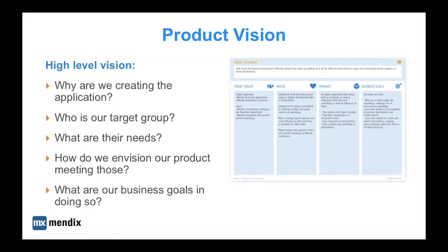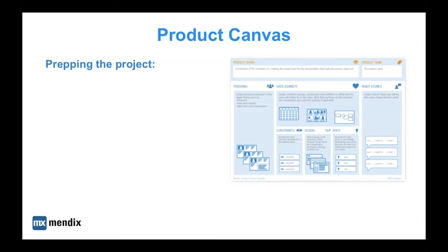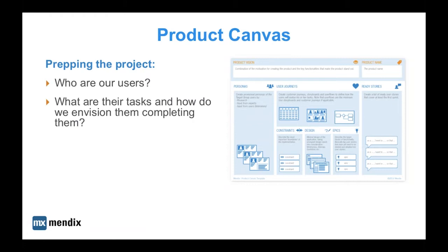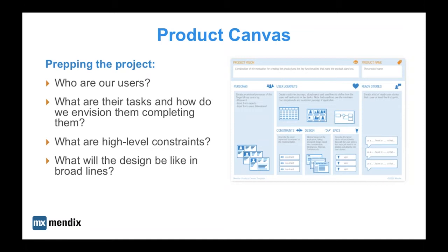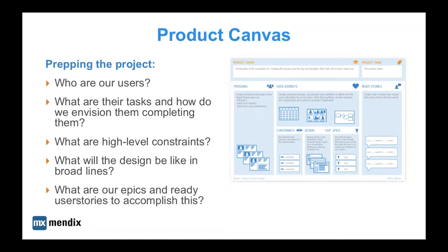Let's prep the project by answering with a bit more detail the following questions. Personas will answer who our users are. We'll use user journeys to give body to the users' tasks and their way of completing them. High-level constraints could be, for example, 'it's only available on tablets' or 'it needs to work within a single sign-on environment.' The design section answers how we're going to realize the user journeys — what do we need to build to interact with our users. From all this we can identify epics and user stories to get the first sprint going.